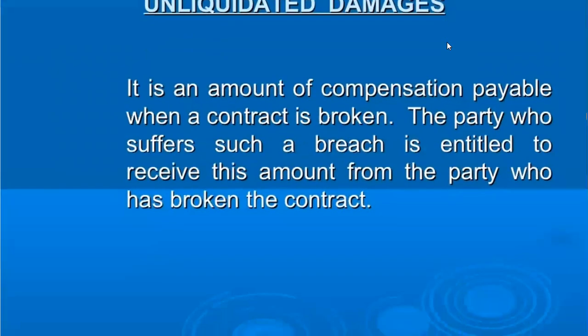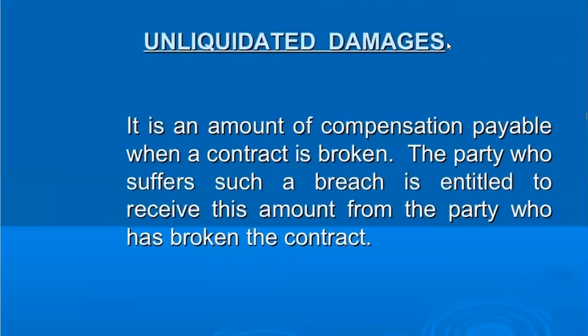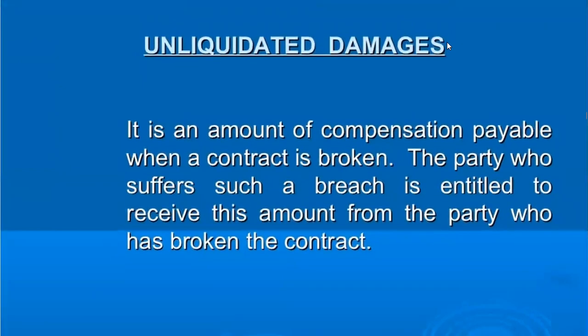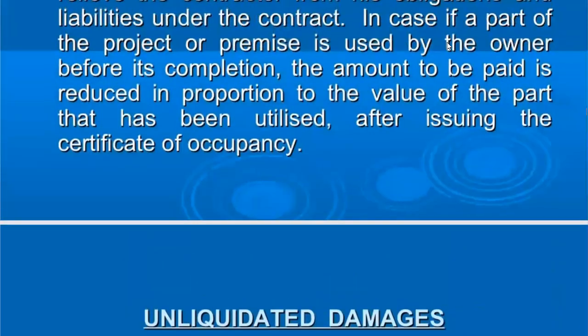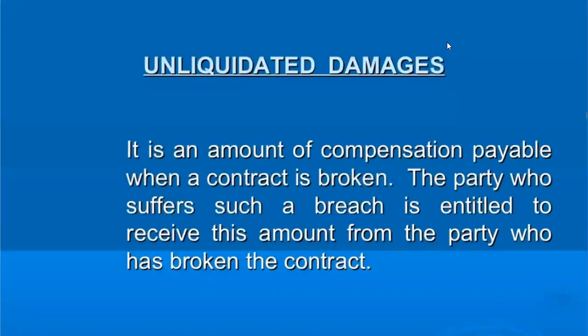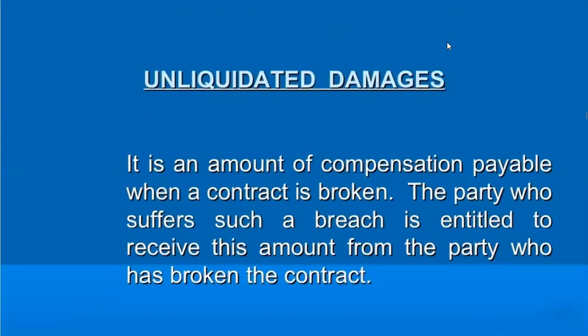Unliquidated damages — it is the amount of compensation payable when a contract is broken. If we have any obligations and there is any breach, an amount of payment will be made. We will call it unliquidated damages because the amount of payment will be made based on actual loss assessed at the time of breach.